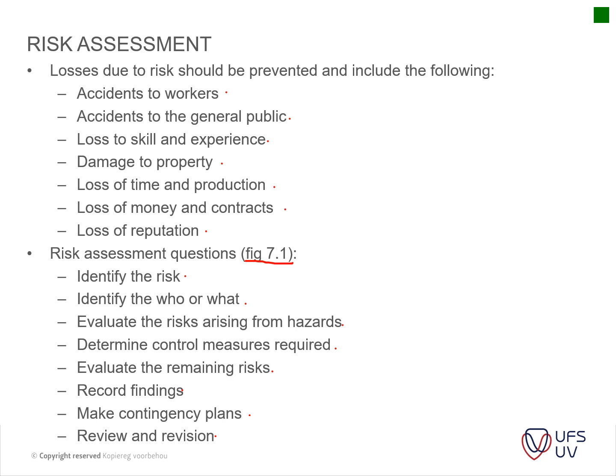These risk assessments are cardinal to health and safety. Usually your health and safety consultants start with a baseline risk assessment, and each month they do an audit and they identify risks. But that doesn't mean that we as construction managers should not look at risks. For instance, some companies have ISO regulations which require you to look at your risks at least every 2 weeks and not monthly, but that is dependent on each company.